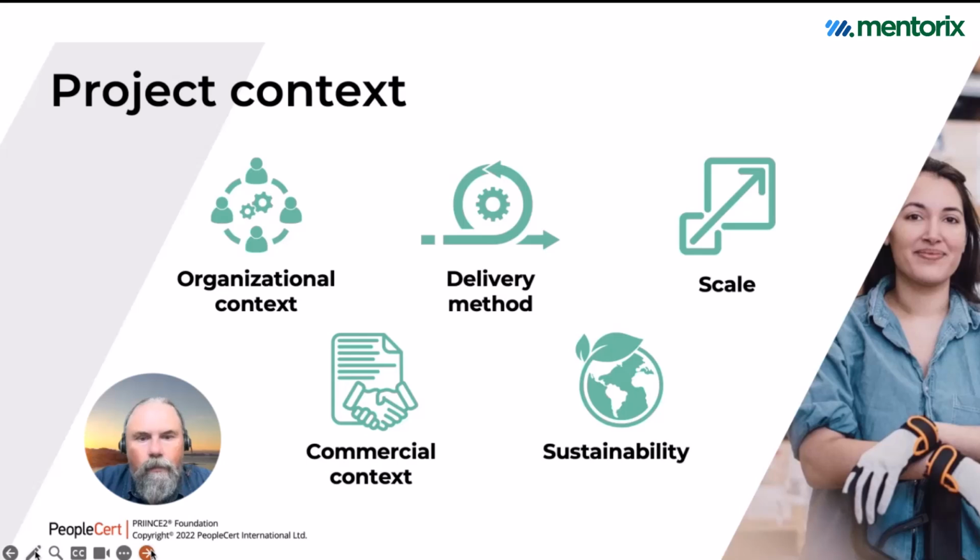A new thing that is appearing more predominantly now is the commercial context. That's recognizing that a lot of projects have different stakeholders, and some of them are actually contractually bound to each other. So even though the methodology says we should be able to stop at a certain stage, that might actually not be something we can do because of the commercial context. So the commercial context is now also more integrated. Again, it places more emphasis on how to and being more realistic rather than being heavy on the theory part. And then, of course, as mentioned, the whole sustainability part is also integrated in the project context.